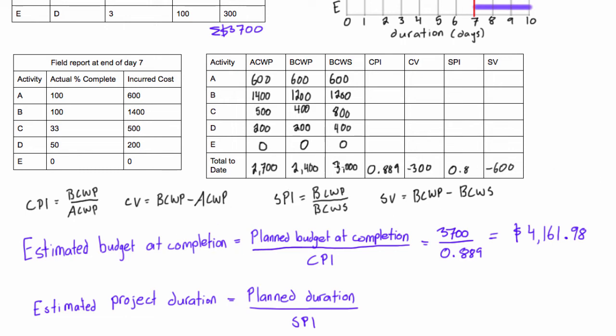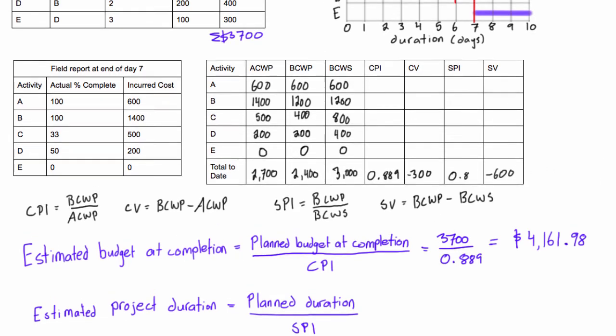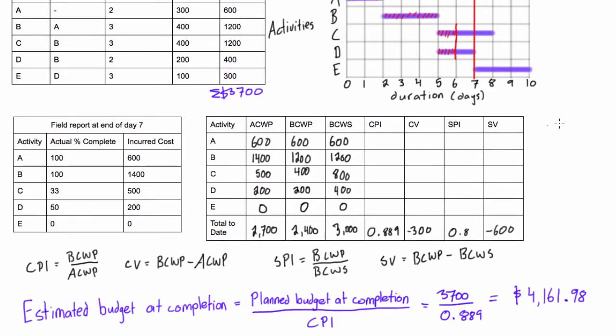So we already know at this point, when we are looking at our project at the end of day 7 when our progress report came in, based on our CPI and CV that we are currently over budget. So if we continue on this path, we'll end up having the whole project cost $4,100, which is more than $3,700. We definitely will be finishing, if we keep at this rate, the project over budget.